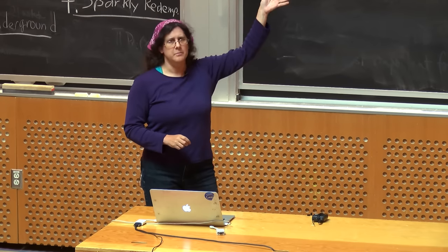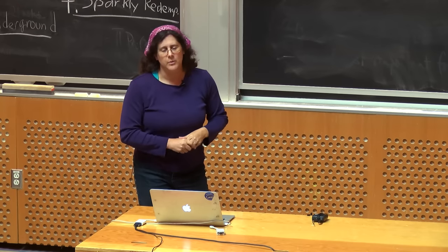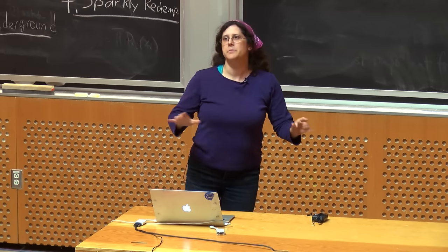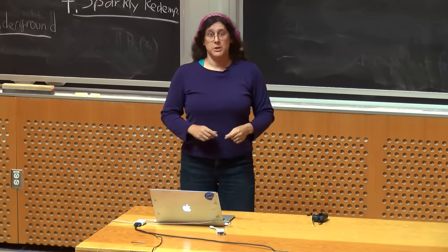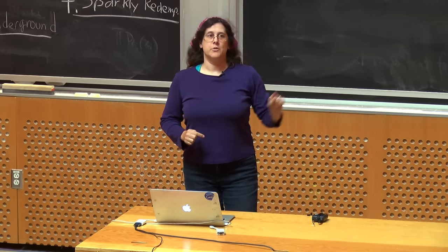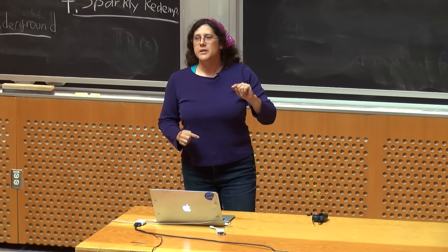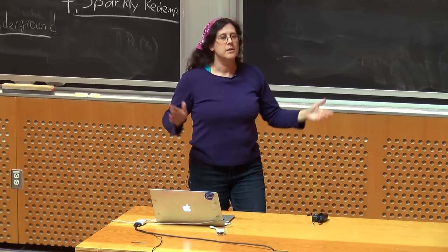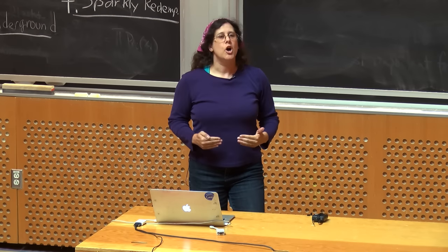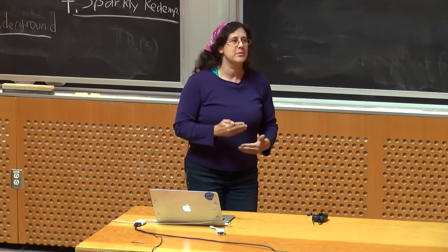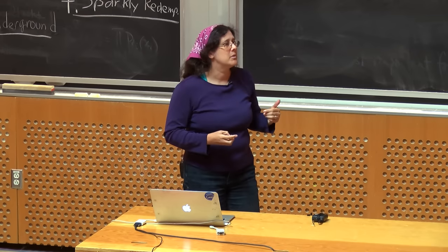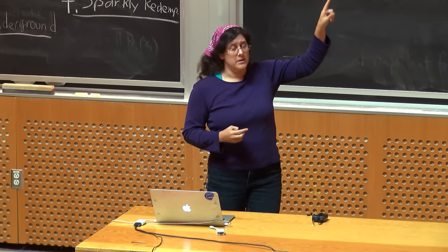Sometimes the answer is nothing, and sometimes the answer is something, in which case it needs to get dealt with. The place where daily scrums often go wrong and end up taking longer than their 5 or 15 minutes is when people mention what they're being blocked by, and everyone jumps in to help solve the problem. That's not what you do at a daily scrum. You mention it, someone makes a note of it so everyone's aware, you get the meeting over, and then the people who actually need to be involved talk to solve the problem. Once again, it's invoking the principle: if you don't need to be at a meeting, don't be at a meeting. So that is my comment on daily scrums.